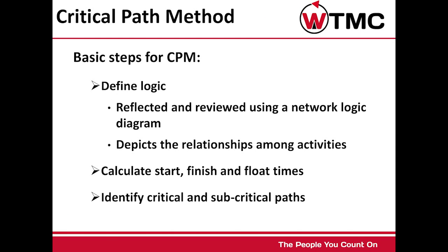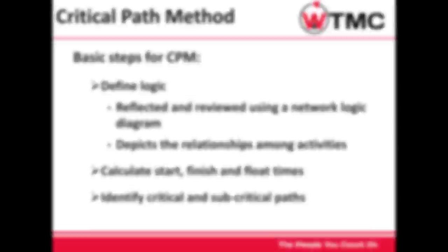Basic steps for CPM. Define the logic. It is reflected and reviewed using a network logic diagram. It depicts the relationships among activities. It calculates the start, finish, and float times. It identifies critical and subcritical paths.